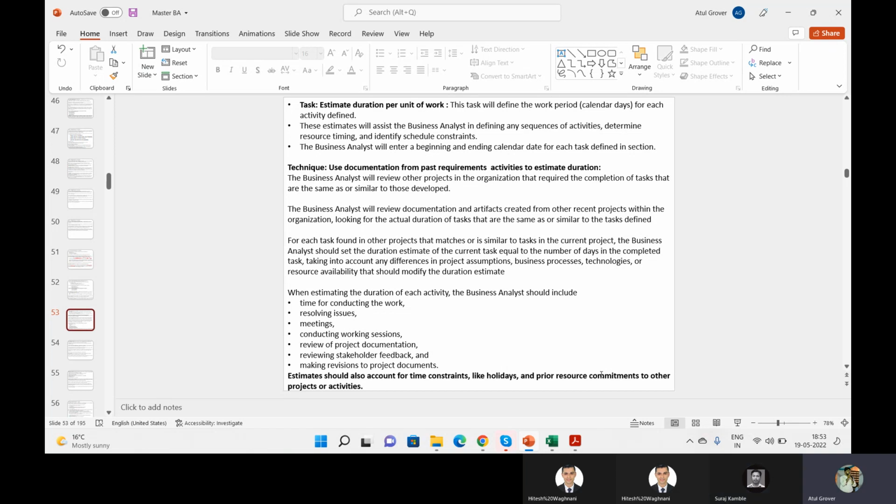See, definitely you have to communicate back to the customer. That is one thing. But while communicating back, you have to give justification as well: why it went from 7 to 9. Because 2 more stories were created as there is a dependency on the other team. So I have to connect with the other team to understand their process, only then can I build this story. So whose estimation was wrong in this case, the BA or the development team? BA. The development team will tell you, I need 2 more stories. You have to communicate to the customer that we are getting 2 more stories, one for this purpose and one for that purpose.